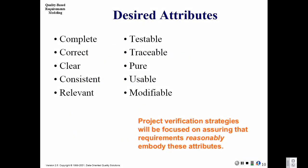What do we look for in terms of the qualitative characteristics of requirements statements? There's a core list of ten things. Is the requirements document complete — does it completely capture the requirement? Is it correct — if I implement the requirement, will it meet the need? Is it clear — can everybody understand it? Lack of clarity is a big problem when you're passing the document to the next person expecting them to implement your requirement. Is it consistent with all the other requirements? You can have very well-written requirements, but when you put two or three together you realize they're not all pointing in the same direction.